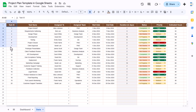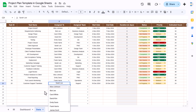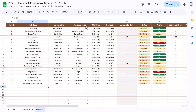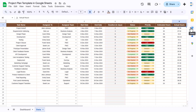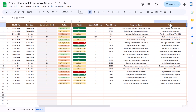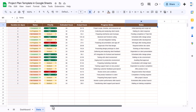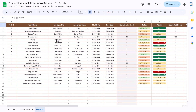In the data sheet we have the task ID and the task name. You can select the assigned-to from a dropdown, and we are showing the assigned-to team as well. We have start date and end date, then the duration which is calculated as end date minus start date. We also have status, variety, estimated hours, actual hours, progress notes, and other notes.